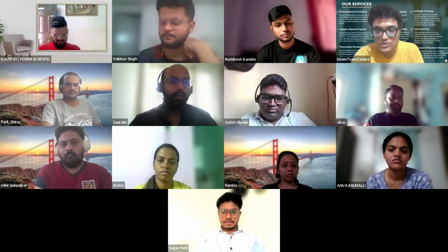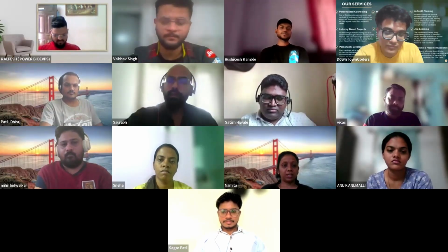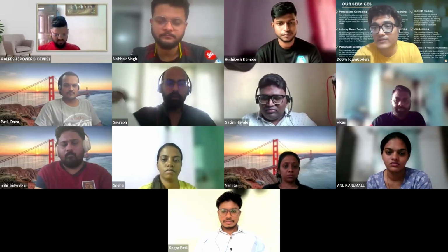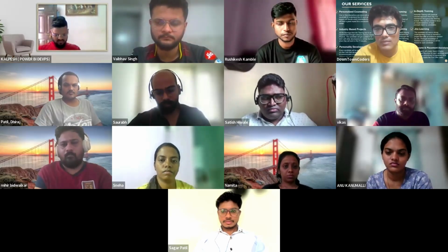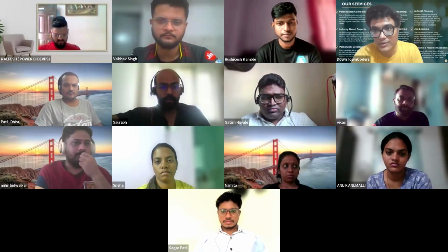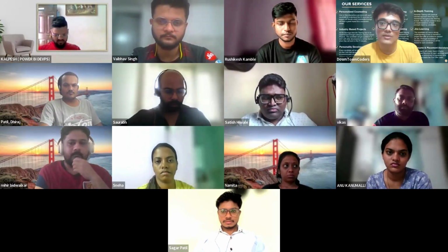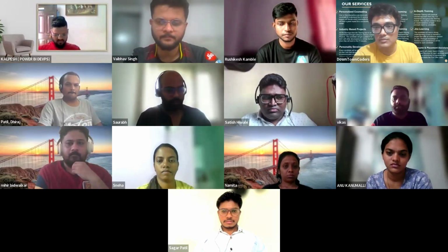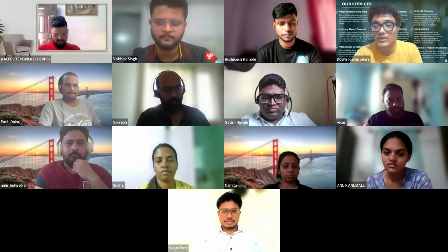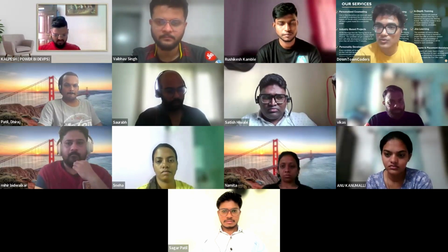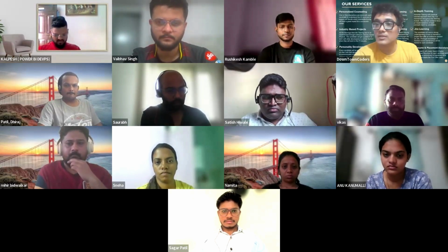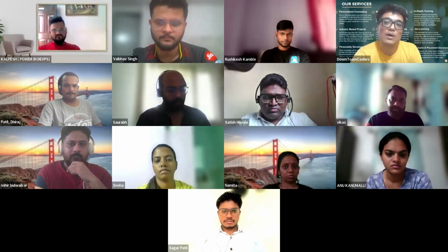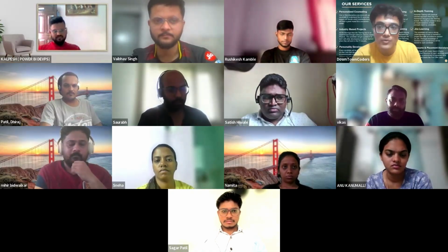Suppose, for example, initially you got the requirement and whatever estimations that you have given, the number of story points had been 15. So the Scrum Master will say, okay, why is it 15? I'll try to find out more work. Then his responsibility kicks in to give you more work. Okay. So now when you started with the work, you found that you estimated something incorrectly and you are taking more time. Then you can increase the story point. But you have to increase the story point only after the approval from your Scrum Master or project manager. You should have that approval.